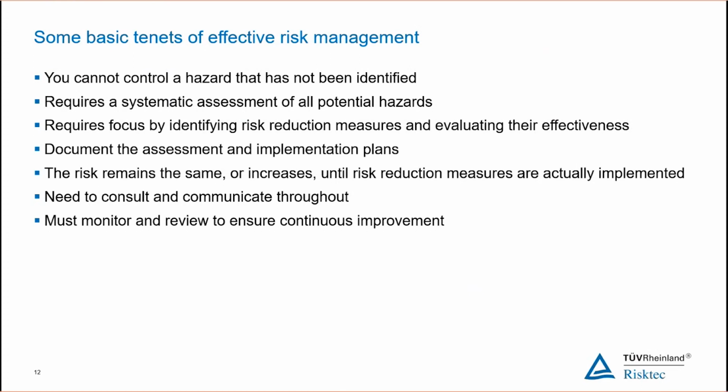So once we have identified these scenarios, that gives us the opportunity to start looking at these controls, and therefore to make sure that the controls continue to work, and these risk reduction measures, these controls, barriers, however we frame them, are and remain effective at managing those risks at that point. We may be in the position of looking to identify further risk reduction measures, but up until the point where we actually put those further risk reduction measures in place, the risk does not diminish until those measures are actually put in place.